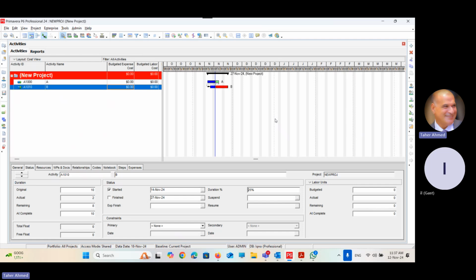As a contractor, don't change what we agreed about without agreement together. Yes, we agree at the beginning of the project to use the logic. Now you need to choose the progress override. All you have to do is send the request with the reason why you made the activity out of sequence.